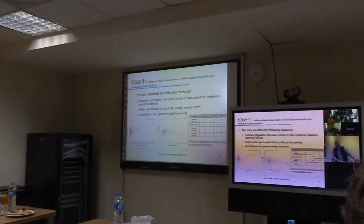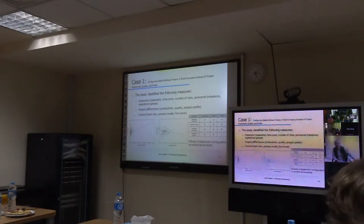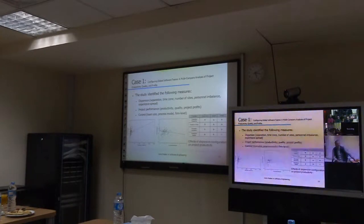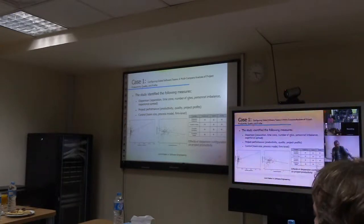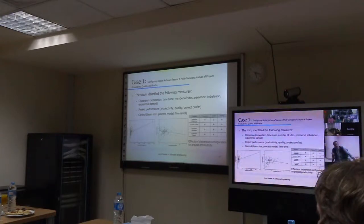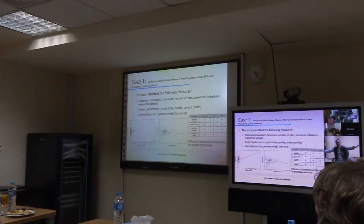That study identified the following measures for GSD. Dispersion is in terms of how far away these people are in my lens, how many sites you have, what's the imbalance between personnel. Do I have a lot of experienced people inside A and inexperienced people inside B?